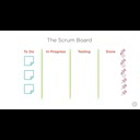In addition, we've also added a sticky note to represent each item that was selected for the sprint in yesterday's sprint planning session. You'll also notice that I've added push pins with each of your names on them to the right side of the board. When you're working on an item, simply use your push pin to hold the corresponding card to the board. This will help us better understand what state an item is in.